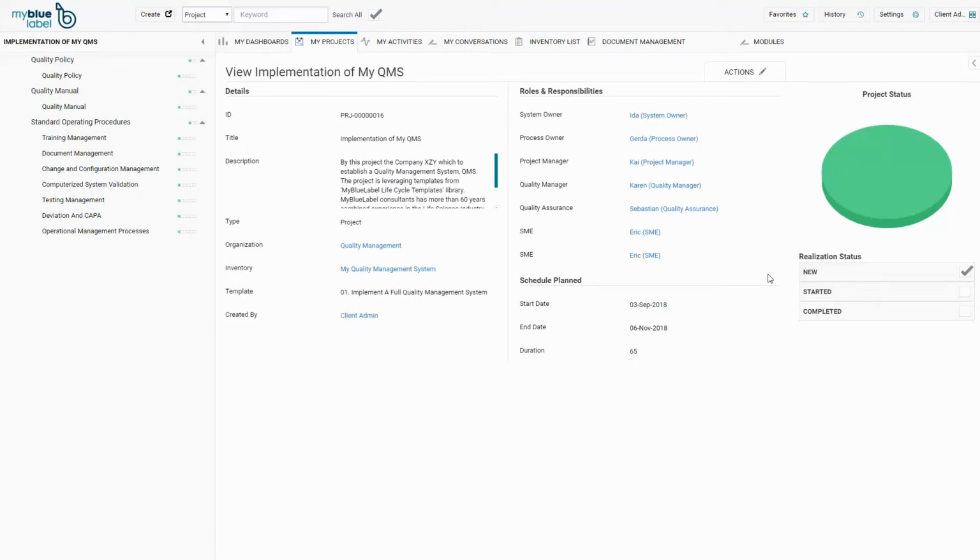The project plan status is now green, which means the project plan schedule is on track. The project plan schedule status is calculated from the individual project plan tasks. If one task is yellow, which means the task needs attention, then there's only 2 days according to the plan schedule until the task must be completed. The task can either be completed in the workflow, or the task start or end date can be adjusted to a realistic start or end date.